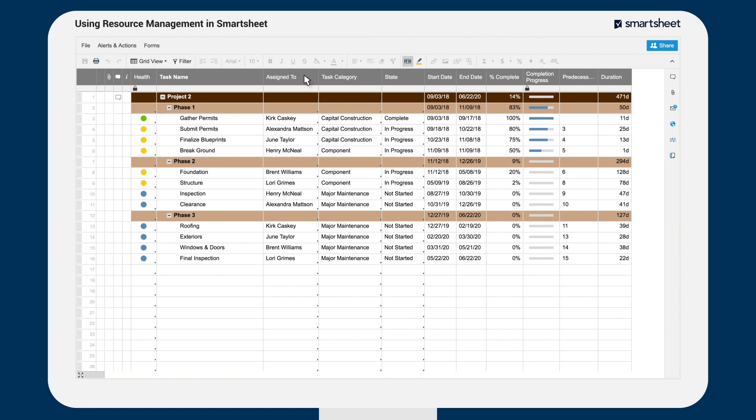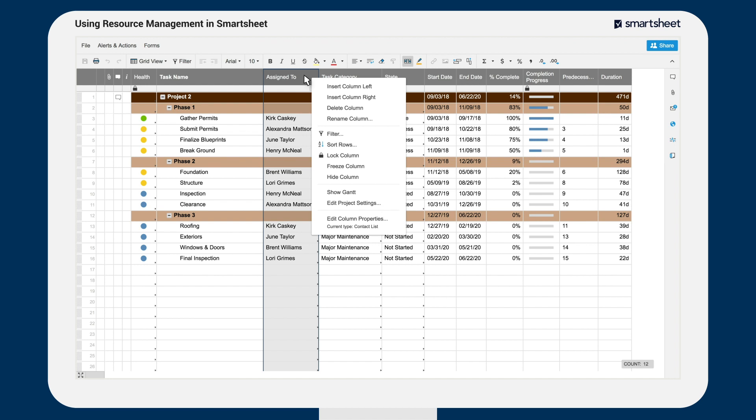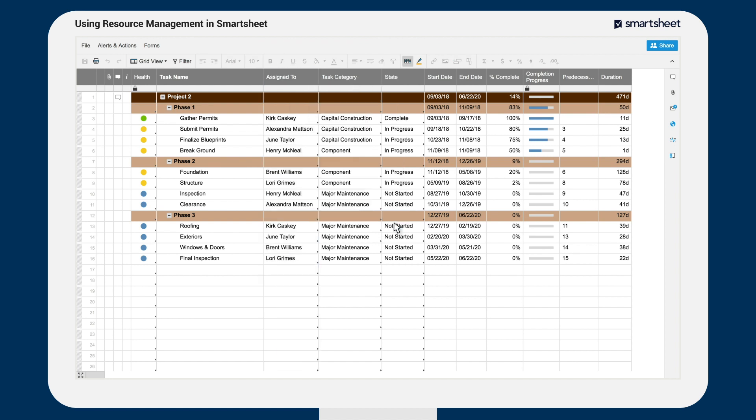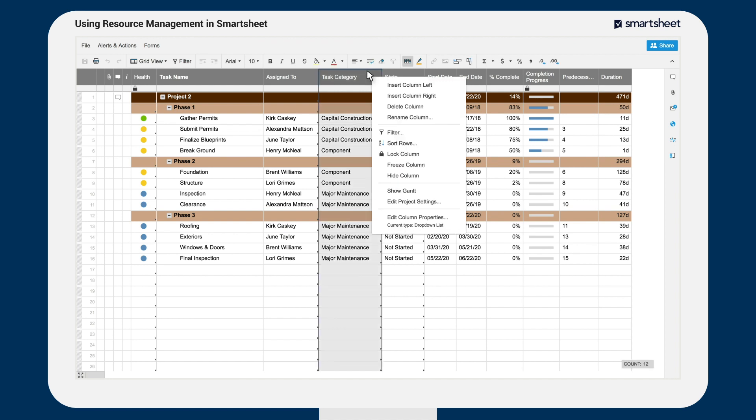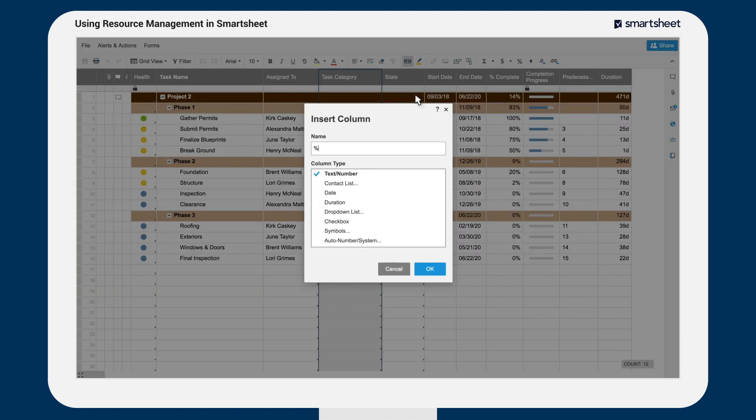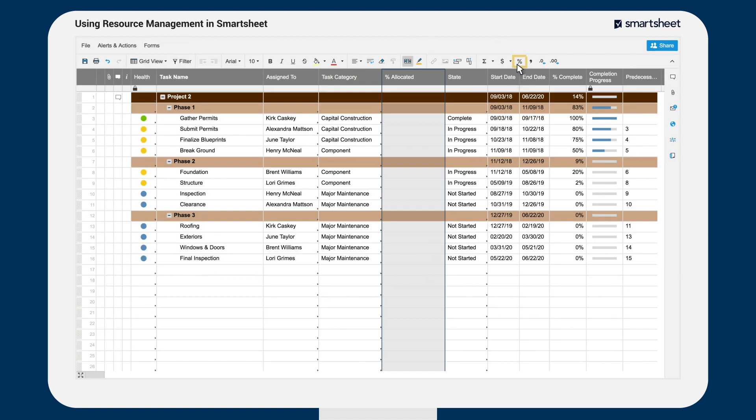First, make sure your assigned to column is set up as a contact list column so you can assign users to tasks. If you're working with resources who are partially allocated to multiple tasks or projects, you'll want to add an allocation percent column to your sheet and format this column as a percentage.